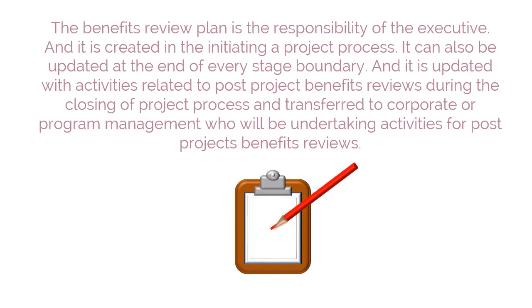The benefits review plan is the responsibility of the executive, and it is created in the initiating a project process. It can also be updated at the end of every stage boundary, and it is updated with activities related to post-project benefits reviews during the closing of project process, and transferred to corporate or program management, who will undertake the activities for post-project benefits reviews.